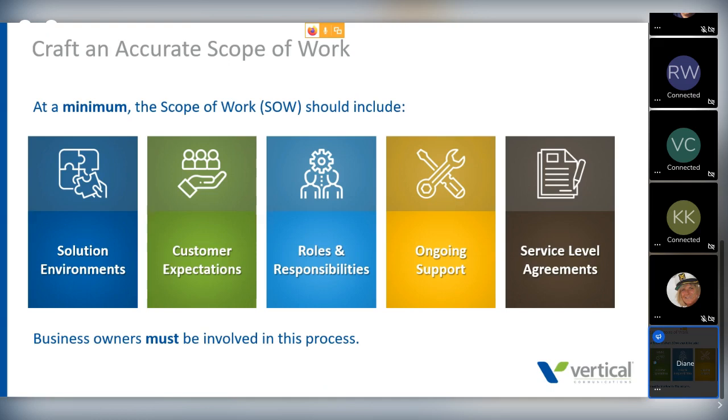This is certainly an area that organizations don't spend enough time on, I find. And it's a very, very important step. I would encourage you not to sign the standard scope of work that is offered by many of the solution providers. What's the reason for that? Well, you need to very clearly in the scope of work lay out roles and responsibilities, both the provider's and the customer's. Why is that important? Well, if it's not done, you may end up in finger pointing during the implementation that results in either additional cost to you or it results in a very negative working relationship.